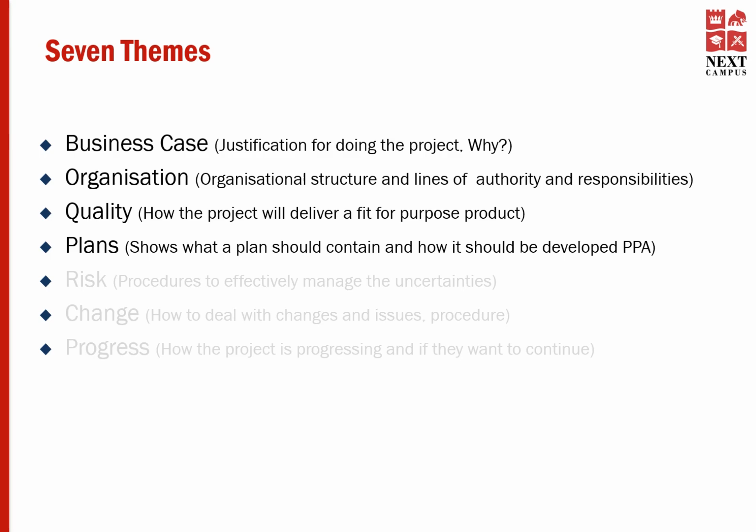The project plan is updated at the end of each stage to show what has been done, the products developed so far, and the plan for the next stage. The project plan gives an updated picture of the status of the project that can be compared against the baseline project plan to see how well the project is progressing compared to the plan. You learn about the different levels of plan.